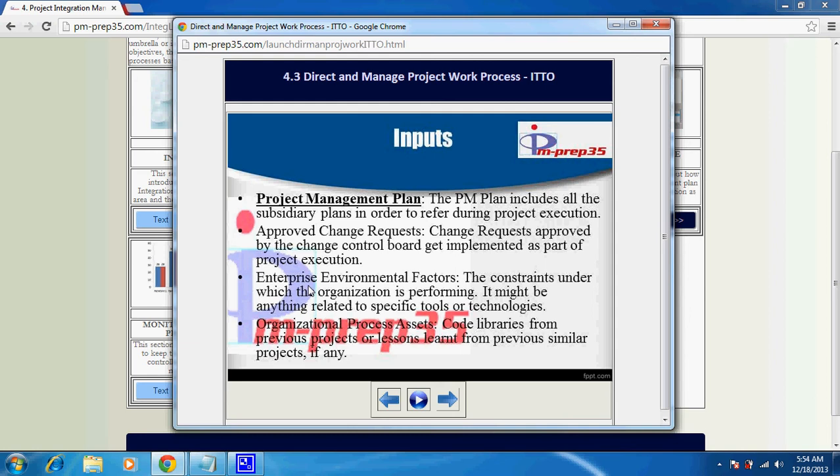You can also depend on something called a project management information system, wherein you're collaborating with your customer. The customer authorizes work through the work authorization system, which is again part of the PMIS. The work authorization system can be an interface between the customer team as well as the execution team, or you can have a configuration management system which is used by different teams.